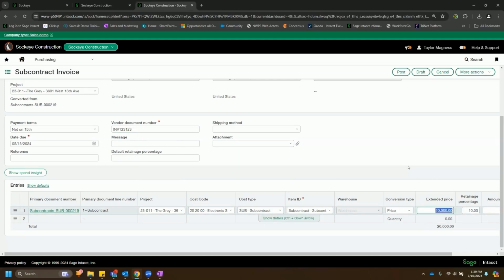So if they're billing us, maybe it's $12,750 this period. We would come in, key that in, hit post or submit. And it's really at this step, kind of tying back to that report that we're talking over on the dashboard, it's at this step that we're moving this $12,750 out of those commitments and over into total cost, right? Because those commitments, we're tracking all of it, but it's not accrued cost yet. So it's at this point that we're accruing that cost.